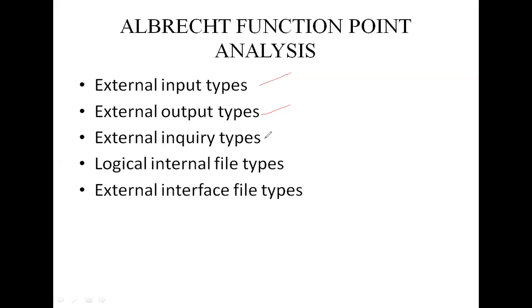Then we move to external inquiry types. External inquiry types are transactions initiated by the user which provide information but do not update the internal files. It will give only information. The user inputs some information that directs the system to the details required.